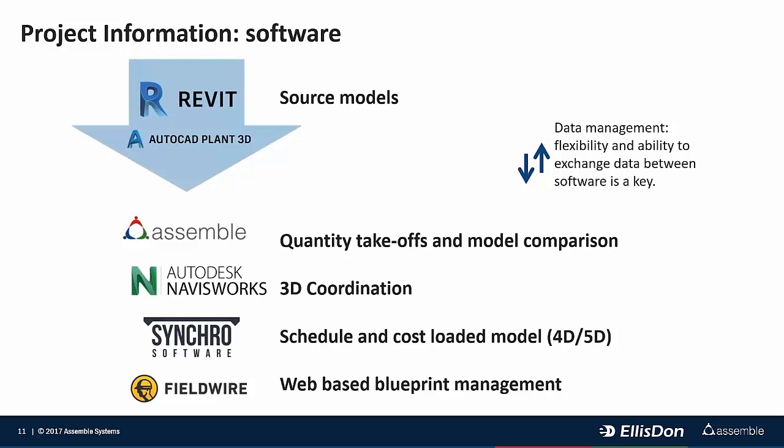And the second model is for the site team with the latest information that is available, that is not necessarily accounted for in the estimate. That's very easy. I mean, they're both on Assemble. Alena can access both of them. She can make sure everything's fine with either one. And she can make sure, we don't want to cause confusion, that the estimating team has access to just the frozen model, versus the trades and other project members who have access to the actual constantly changing progress model.